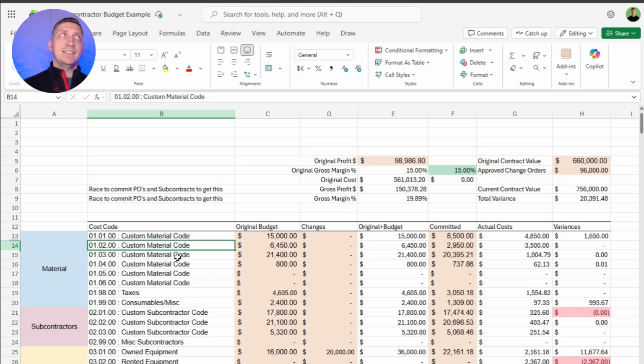We put in PVC. We put in anything that's a massive purchase order is how I think about what should be in there, because it makes it easier on your accountant. That way you get more timely reports, because granular is great, but if it's done 3 months late, you can't make a decision anyway. So just my 2 cents. You put in all your cost codes, whatever you want, up to 10,000 again.